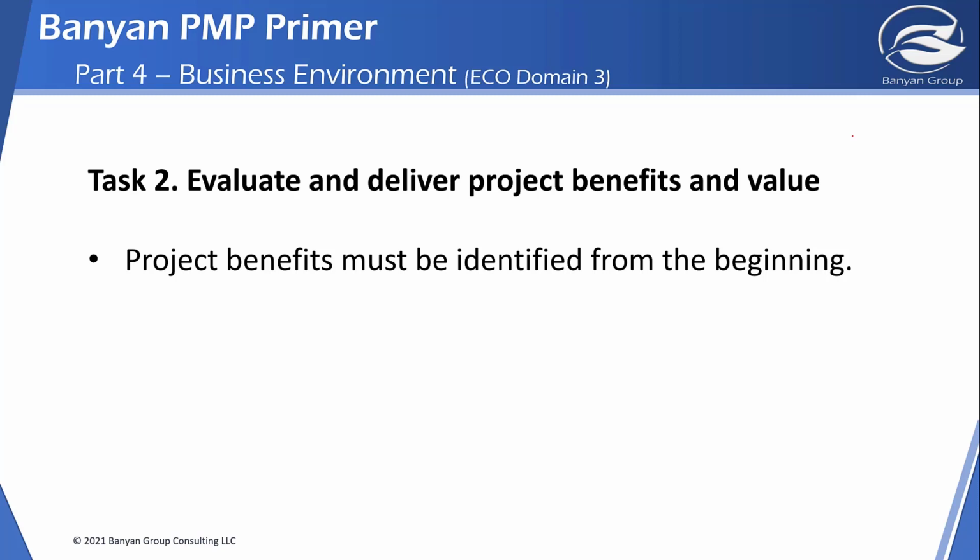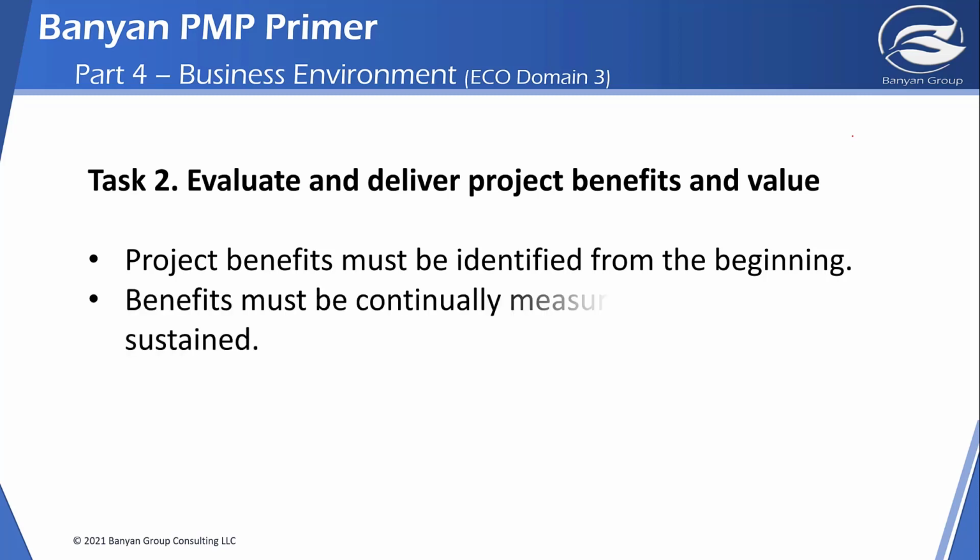When we're comparing a project business case against other business cases, we usually tend to select the ones that provide the best value for the business. That's important. That usually gets our project selected, but it's also equally important that throughout the project we continue to monitor that benefit to ensure that the project is still viable, that the benefit is still real, and that it still equals what we originally set out to accomplish.